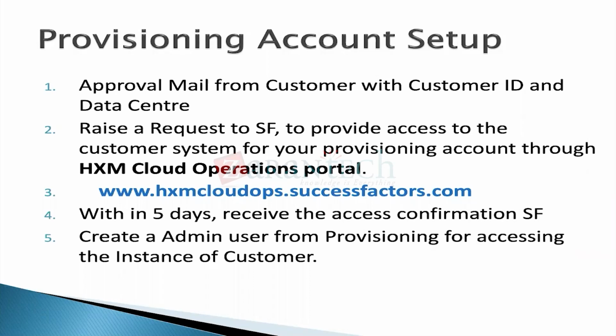Somebody from IBM has to introduce you to the client-side manager, saying, he's Mr. Shiva, he'll be working for the Employee Central module in your project. He is Mr. Naresh, he'll work for the performance management module. First, that client interaction meeting has to happen. Then the client will know who you are and they'll provide the approval. They can't randomly approve an email if you send it out. That can take sometimes just the first week, sometimes 2 weeks, sometimes 3 weeks. It depends. So that will be the first thing.